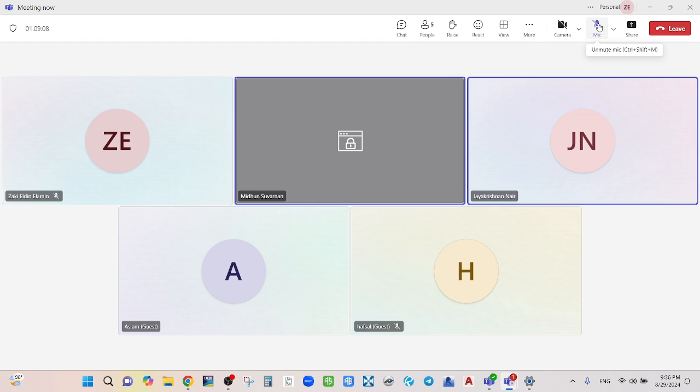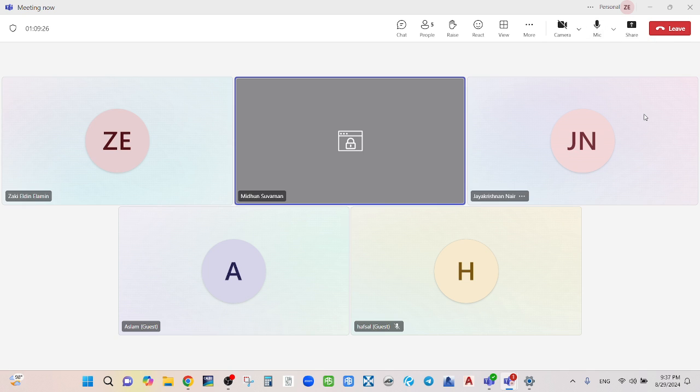Because if you have this, it's called a lien. If you have this, you can sue the employer. You can tell them, okay, fine, I have a contract with the main contractor only, but you are getting the benefit, it's your project, you pay me straight away. But normally a waiver of lien will be there in the contract, because the employer knows that subbies or suppliers will come with these claims, since the main contractor sometimes delays the payment. So they always tell that a waiver of lien should be there. They don't want these issues.